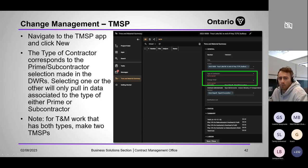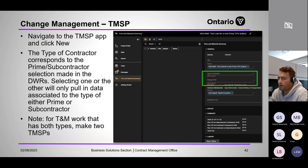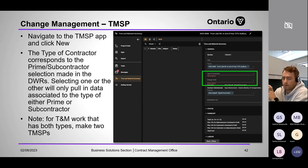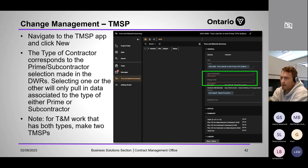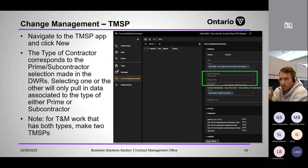This is a huge improvement — change management has been completely overhauled. Previously we couldn't separate prime and subcontractors, couldn't separate union and non-union, and couldn't progressively pay TM change orders spanning multiple invoice periods without closing and creating a new change order. Now all of that is solved. We can pay progressively as many times as needed, and if the TMSP comes in higher than the original estimate, we can recirculate the change order for DOA without cancelling it. None of those were possible in WB CMS.